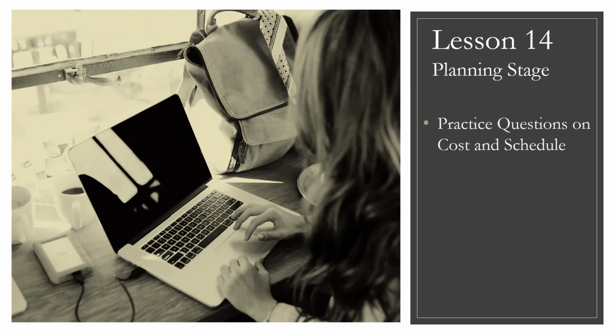If you know the schedule well, which basically means if you know the scope well, the schedule has to be known well, because the ultimate thing of the project is scope in a waterfall method. So if the scope is crystal clear, it will be easy for you to decompose that scope into a work breakdown structure and develop that into a schedule. And if you know the schedule well, then it will be pretty easy to find out the number of man hours needed for each of the activities, and then you can base your cost on that.